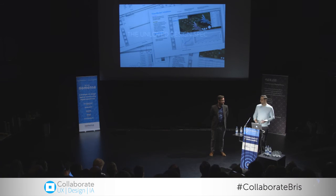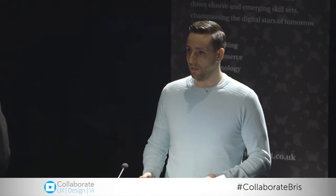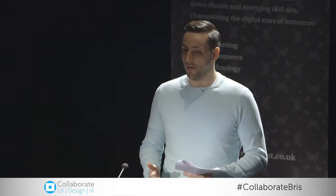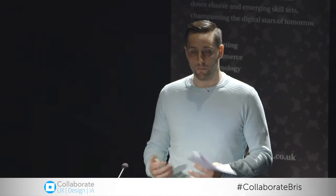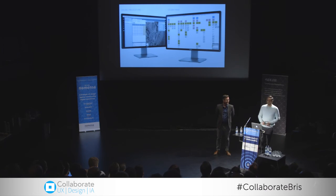As Matt was from an agency background, we thought that producing a design spec was the way to go, but being agile, we thought we should try and make this lightweight. So that's what we did. The spec was successful. It gave us a coherent vision for the first time, but it didn't quite fit with our agile practices and agile process. It was still too big. Matt spent a lot of time trying to maintain it, and the developers still found the document too big to really fancy reading it. So it was a little bit of a flop. So yeah, we had to find something else.